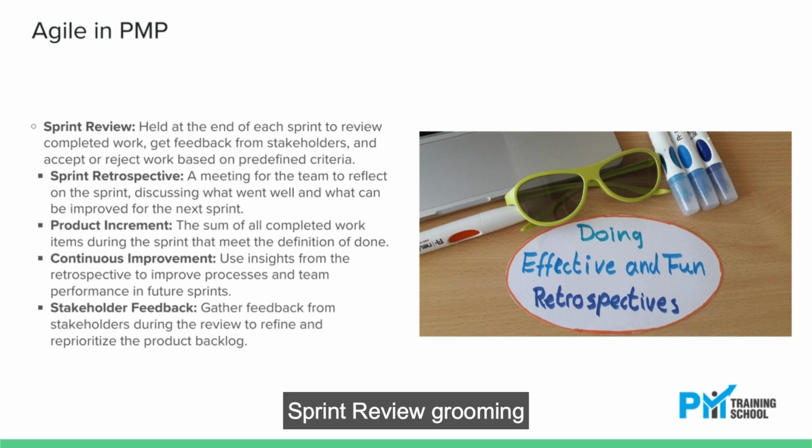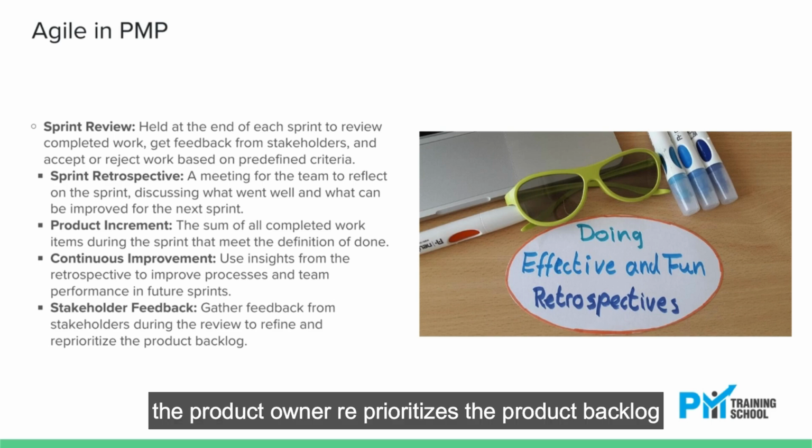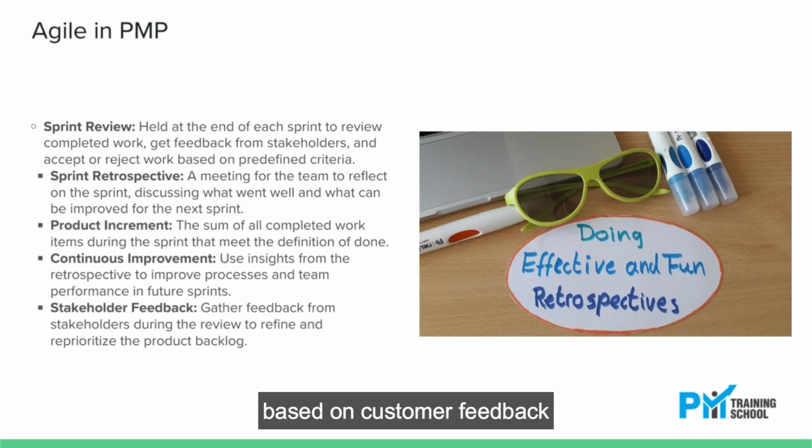Sprint review grooming. Once the demo is done with the customer, the product owner reprioritizes the product backlog based on customer feedback for the next sprint.